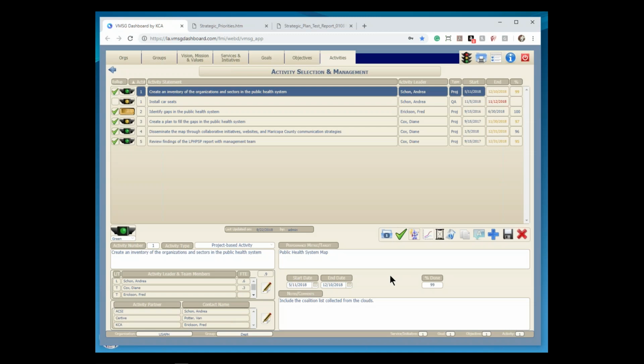Yeah, you're exactly right. The thing you can do in that case is, instead of saying we're going to improve over a baseline, you just say we're going to improve by 20% or something. Then you may need an activity that estimates a baseline to start with. Once you get through the activities to reduce smoking at Wayne High School, you go in and do a measurement. Or maybe your first activity is to do a measurement to get a baseline, like a blind survey to students in the school saying, how many of you vape or use tobacco products, to build your baseline.